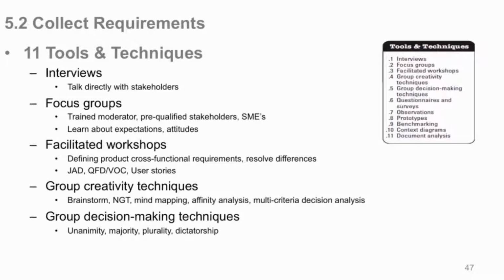You may need focus groups. Again, this is where if things are just that big and that complicated and you have a lot of decisions to make, options, alternatives amongst your requirements that you may receive, you may need to do focus groups that has a skilled moderator there with pre-qualified stakeholders this time, those who are most in the know for the bulk of the requirements. You want to get them in a room with subject matter experts to hash it out, and you can learn more about their attitudes and their expectations. A lot of times focus groups have people in a room, with the glass on the wall. You have people taking notes in the back so that they're not intimidated by who's back there, so that you get more honest, open opinions about things, and then they take it from there. And again, you can use many of these things together or over time in the project.